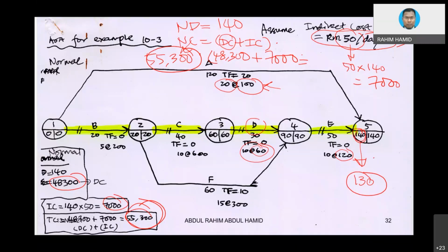In construction it is the same. Certain activities you can do in a normal way, but you can also do them in a compressed version. Compressed version means in reality you need to add more working hours. Instead of working from 9 to 5, you have to work until 7. Then perhaps you can shorten the activity from 3 days to 1 day, but that is its limit. 1 day is the limit; it cannot go to half a day. Sometimes it is no longer logical. That is what it means. Alright.